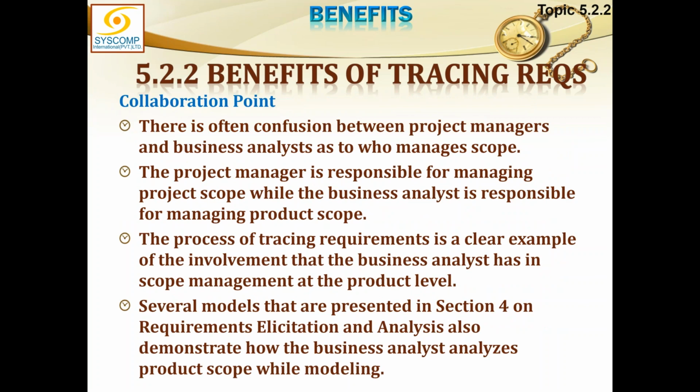The collaboration point here is there is often confusion among project managers and business analysts as to who manages scope. The project manager is responsible for managing the project scope, while the business analyst is responsible for managing the product scope. This we have said earlier as well.